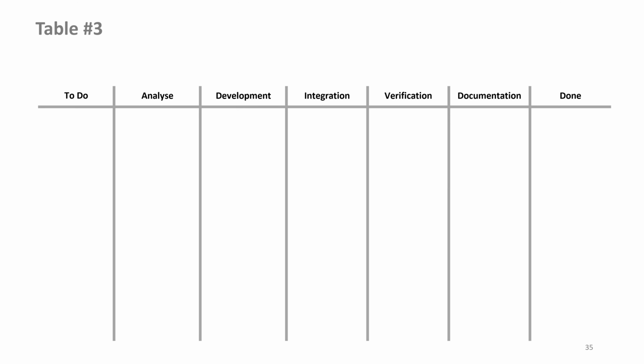Up here we have a definition in the form of a document symbol of what all has to be present as a result in this work step so that it can be considered finished. Only then do we go to the next step.